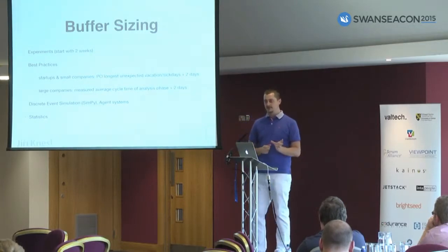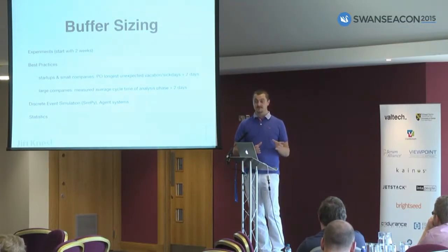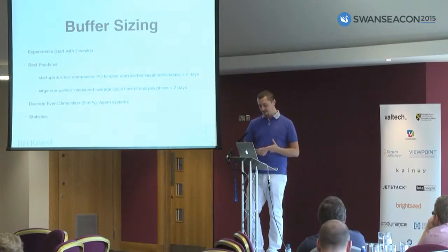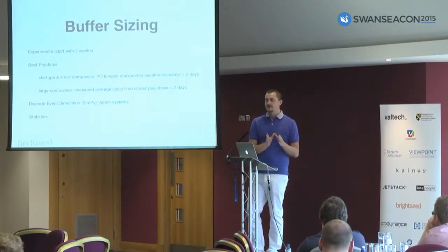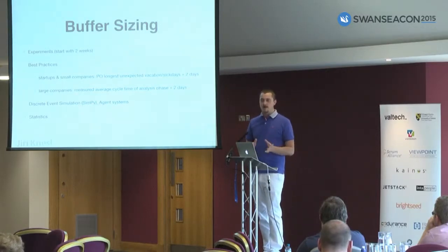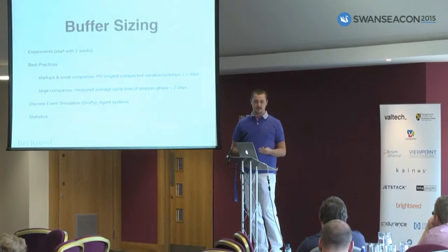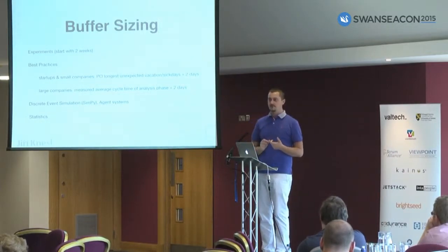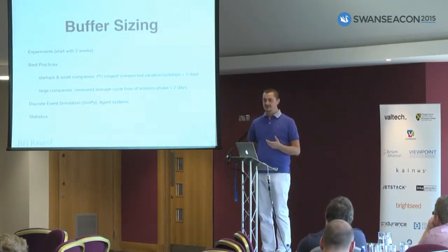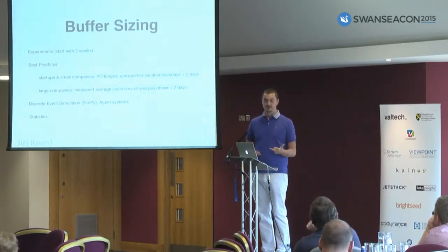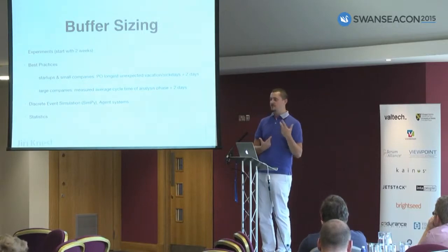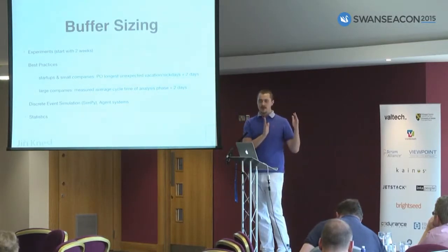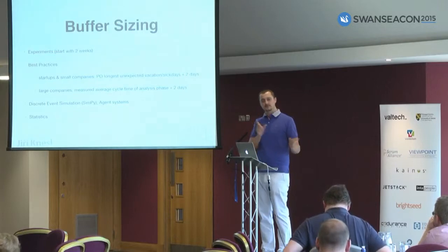For startups and small companies, you have a product owner, and you take the longest time they unexpectedly missed for some reason. They were sick or something like that. And you add 2 days to this time. So for example, you know that the product owner was sick for 3 days. You didn't expect that, of course. Plus 2 days, so we have a buffer of 5 days of work. And you slide the work by 5 days, and your time to market is the time to deliver, the time to implement something, plus those 5 days.